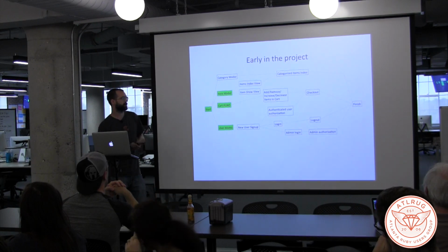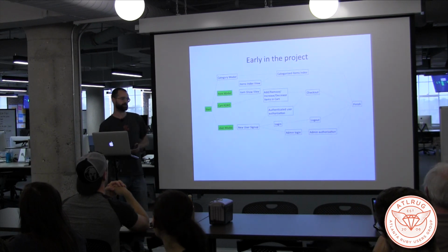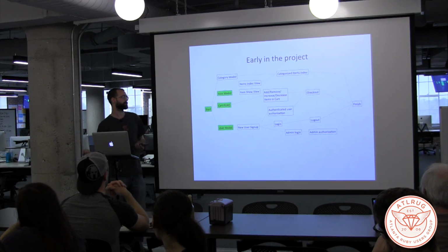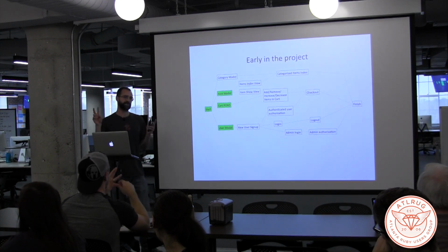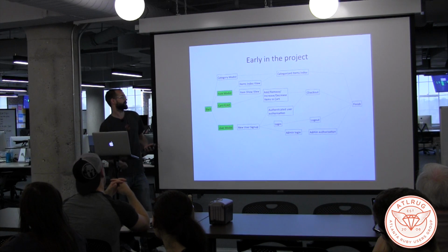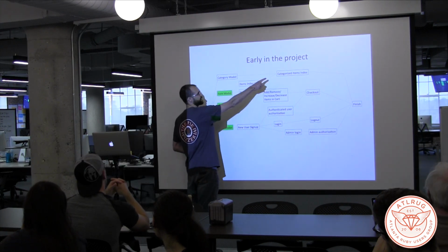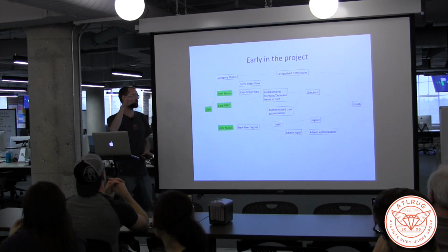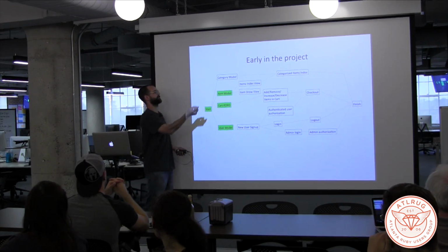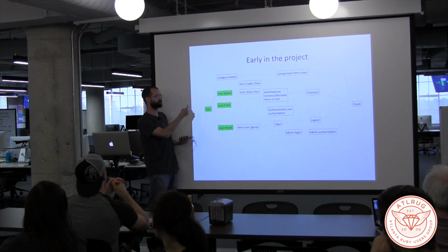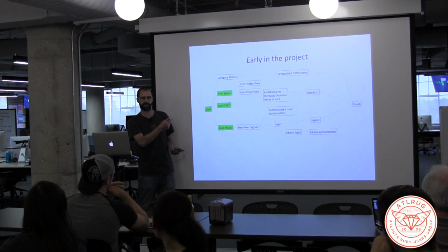On a project that I worked on with a 3-person team, where we made a Rails app that was a simple e-commerce app, this is our agile critical path plan, this is how we started out. Just to illustrate, if we wanted to have some page where we have items sorted by category, we'd first have to have a category model finished, and also a regular items index finished before that.